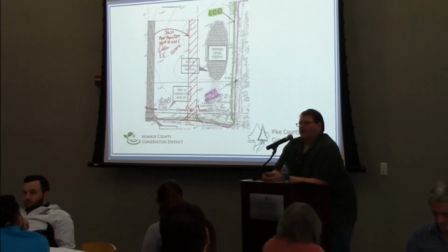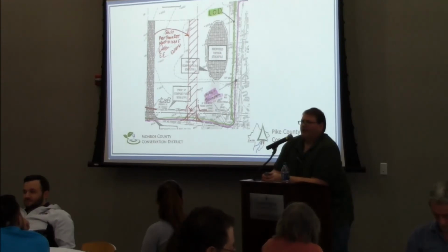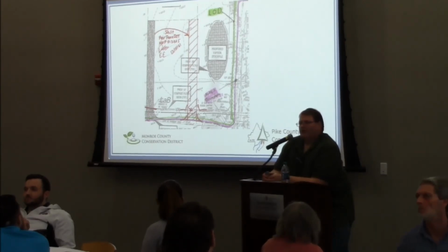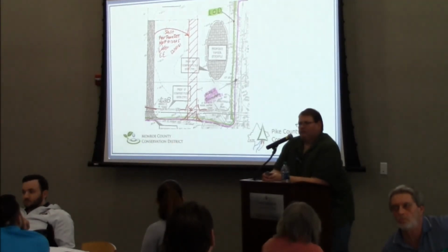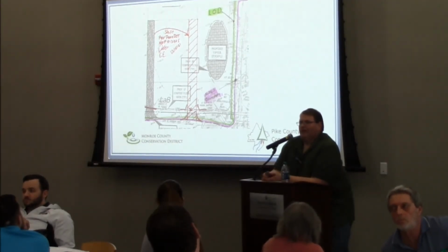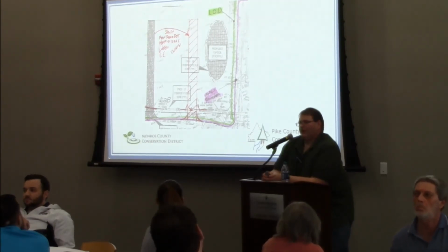Here's another one, and I'm sure this never happens. You get your PennDOT permit after the NPDES permit. And now a whole bunch of things have shifted, and PennDOT wants you to shift your rock construction entrance over to be more in line with the driveway across the street, or for whatever reason, they say we want it moved. So that would be a good example of a minor modification, or not minor, a field change.